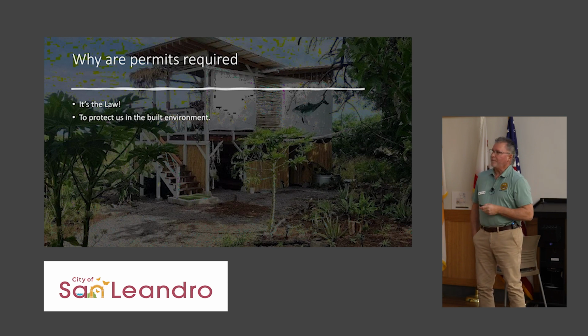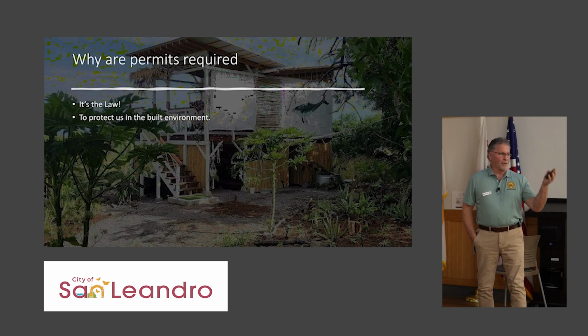61 units, that last photo. And that's how I, as a building department, keep us from possible electrocution or flooding the house. If you residential folks want to pull a permit as owner-builder, if you sign that box that you're doing it as owner-builder, you put a lot of liability on yourselves. By law, I have to grant you that permit, but I also have latitude. If I talk with you at the counter about electrical and you just don't get it, I can refuse that permit and have you get a contractor to come in and pull the permit. That's safety related.